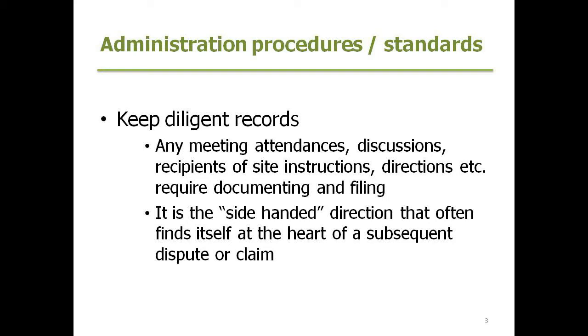So, keep a record of all communications on the project, so that meeting attendances, minutes, and discussions are clearly documented and put into diaries, site instructions, and directions. It's all filed and easily accessible again, should you need to provide it as support. Quite often, a number of these forms of communications are put together to form the evidence of what the claim is, what the variation is about, why we require more time, or why you're not going to get more time.